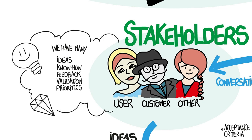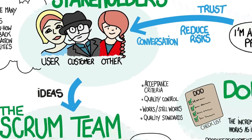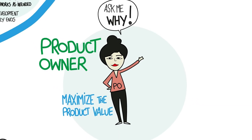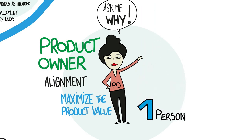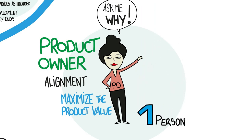validation, and priorities. The challenge is that stakeholders can be noisy, have differing priorities, and have other things to do. Committees can be notoriously slow in making decisions — let's call this the alignment problem. Scrum solves the alignment problem by designating one person who is authorized to make decisions about the product: the product owner. Her decisions are visible in the content and sequencing of the product backlog and in the increments produced every sprint.